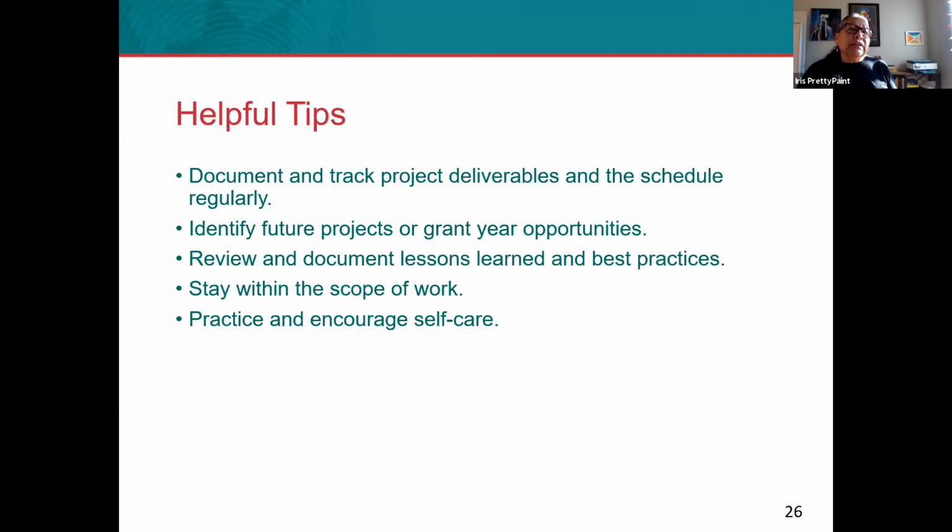And I just want to say here briefly, lessons learned, or what people are calling best practices, that also requires a level of management. There are different types of lessons learned. There's a step-by-step process that you go through to be able to capture those. And so I'll say here as a tip is to come up with a plan for yourself on what kind of process do you want for lessons learned. Sometimes it'll be key phrases that you want to make sure that you capture, and who will do that, and when will you discuss lessons learned. Will it be at the end of the first quarter? Will it be when something comes up during that quarter? And then how will you write about those at the end of the project is very important.